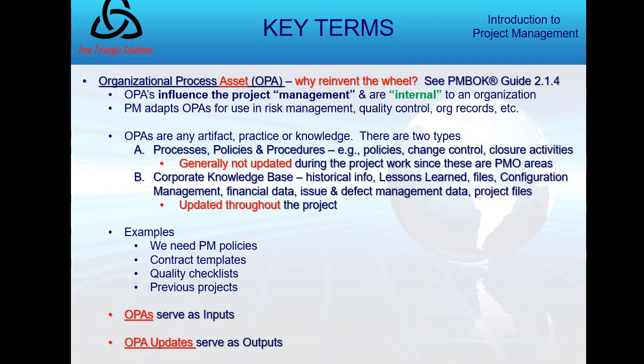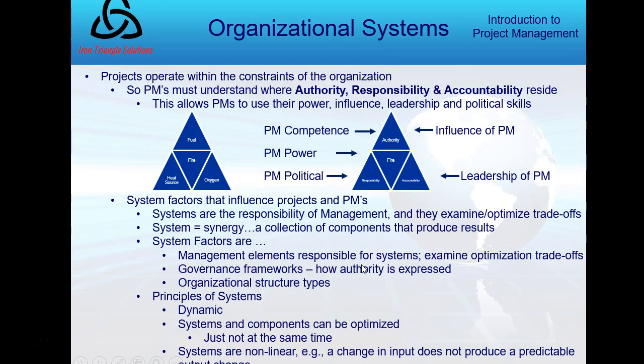Part A, processes, policies, and procedures are generally not updated, but Part B, corporate knowledge base, is updated throughout the project. OPAs generally serve as inputs, and so do EEFs, by the way. Once in a while, OPAs serve as outputs, especially when we want to update them, say, in a closing process. Okay? Then we move on to organizational systems.